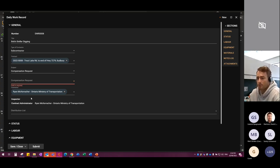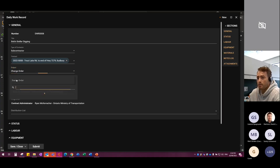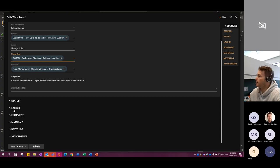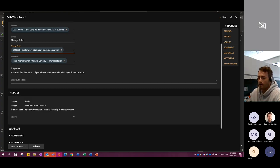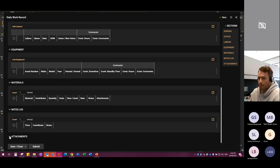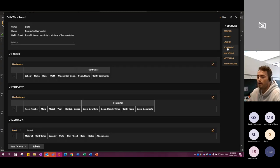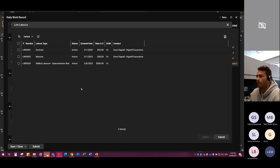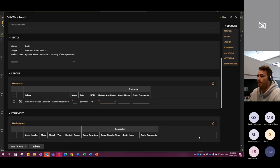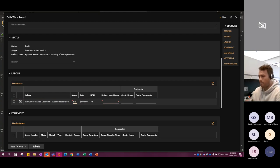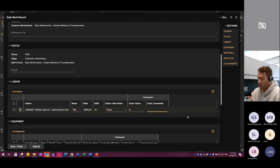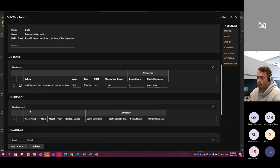You just have to fill out and submit the CR — then you can immediately take daily work records against it, as per the general conditions and the SPs that amend it for Construction Act changes. If you change this to Change Order, you can see your change orders listed. Select the appropriate one — for example, exploratory digging. Scroll through sections by jumping down to whatever you want. Link laborers, selecting from the labor list we built — today we're doing Bob — eight hours. Then link equipment: five hours working, zero downtime, zero standby.